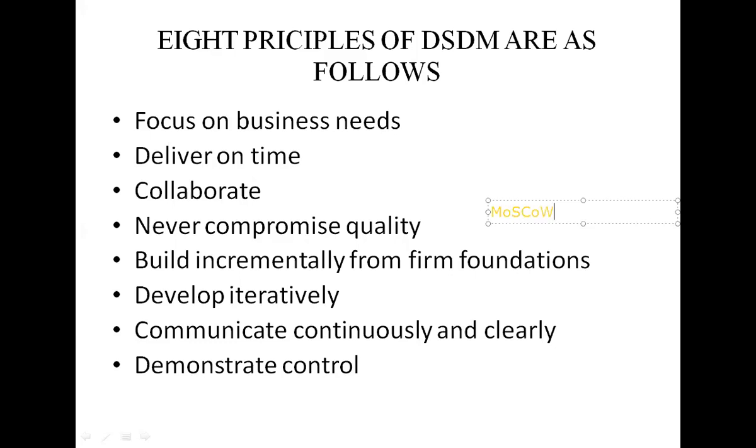Before the deadline, we complete our project. For example, time boxing of 6 weeks or less, with a set of tasks resulting in a deliverable. Here the time and tasks are fixed, not the deliverable. This is about time boxing, focusing on business.